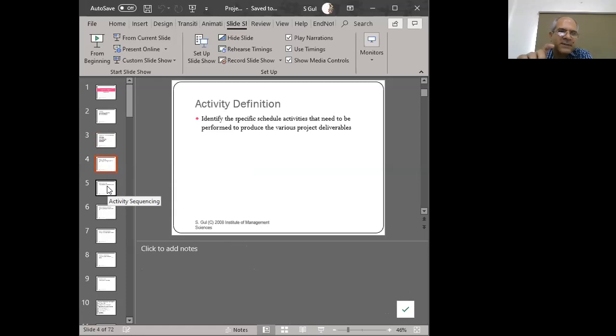One is that there's a product decomposition taking place, and the second layering of the WBS is that that product becomes assignable. That smallest piece of that big project becomes assignable either to a group or an individual. And if that group or individual performs the work, then that particular deliverable or piece of that deliverable is going to be produced for us, right?